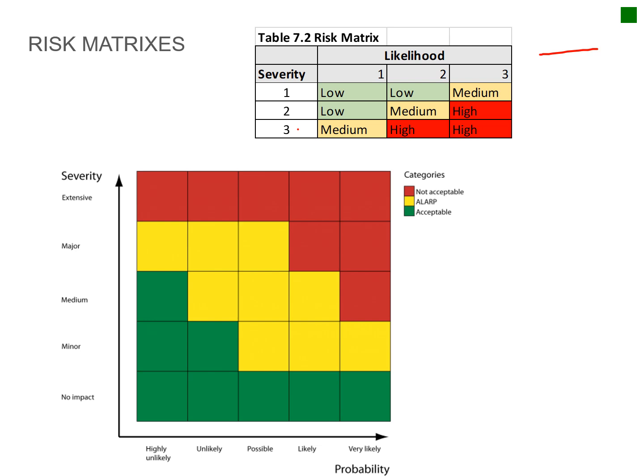So for instance, if it's in a built-up area, the chances of it actually happening is 2. So instead of just putting up danger tapes, you may put up barricades. So in this instance, your risk will be highlighted as a high.